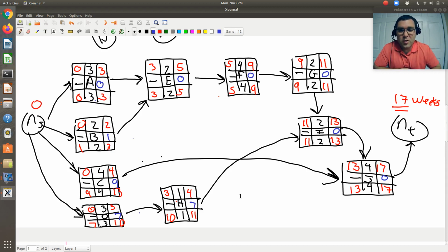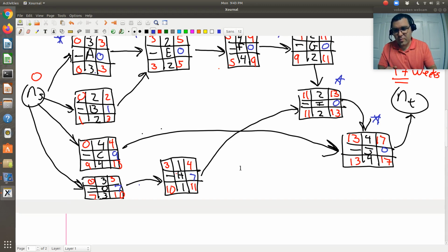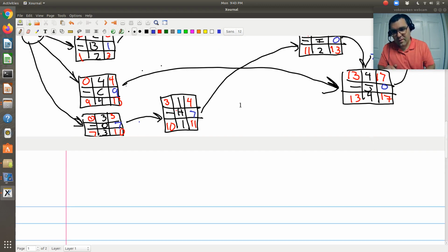Okay. So my critical activities, the ones where there's no window during which that activity could begin, it has to begin at that very specific time, are going to be A, E, F, G, I, and J. So we would say my critical path, now I've got to go over to the next page.